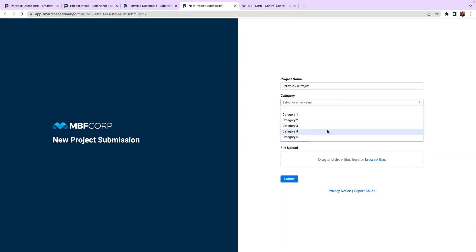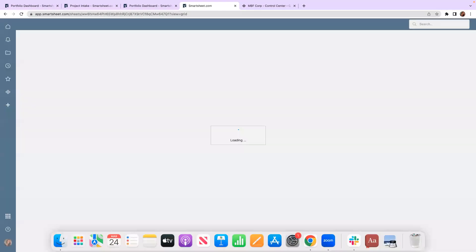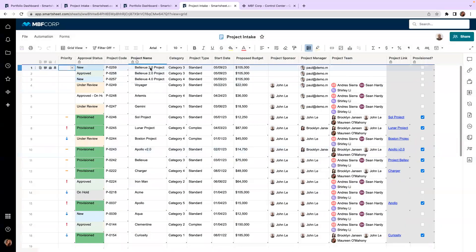I can add my project name and any other pertinent details for my team to start considering my project. Once I submit this form, I'm going to be directed directly to my intake sheet so we can see what happened there. And just like that, we can see I've got my new project that I've submitted with all of those details. This sheet has all the project details listed so that we can compare and make approval and prioritization decisions. We can even leverage core sheet abilities such as automations to build out things like approval workflows, updates, or alerts.